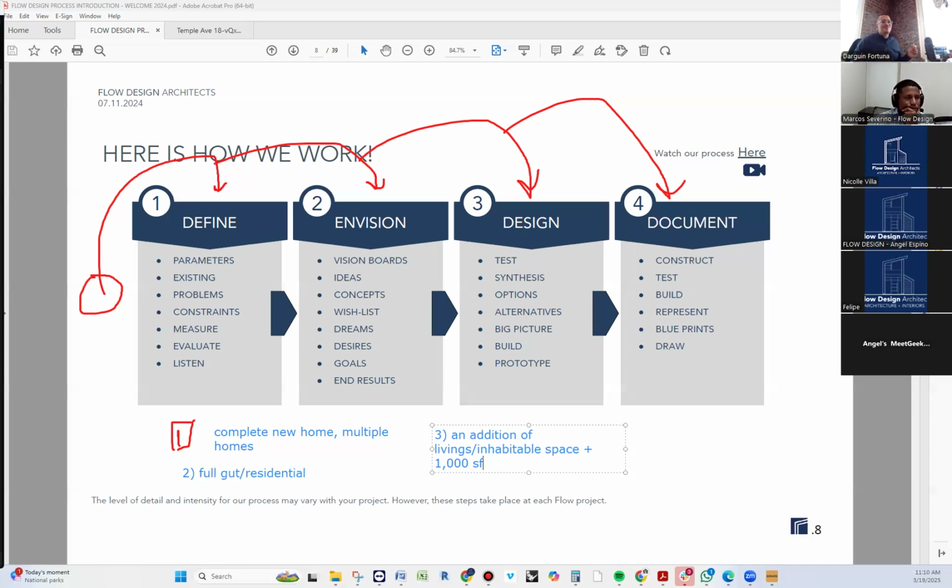Now, if you're doing number 4, you would say, Darwin, what if I'm doing an ADU that's 900 square feet? Will I need a Hertz rating? The answer is yes. It is a new dwelling. So if it is a new dwelling, it is comprised within the new dwelling. So you should have or would have a requirement for a Hertz rating.